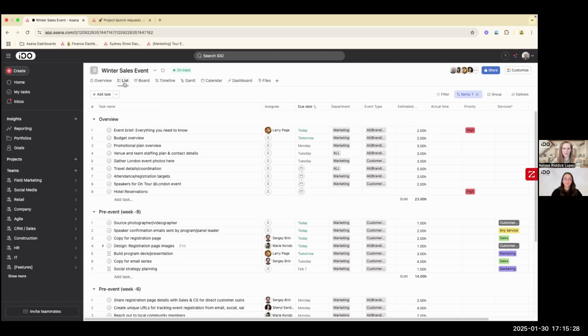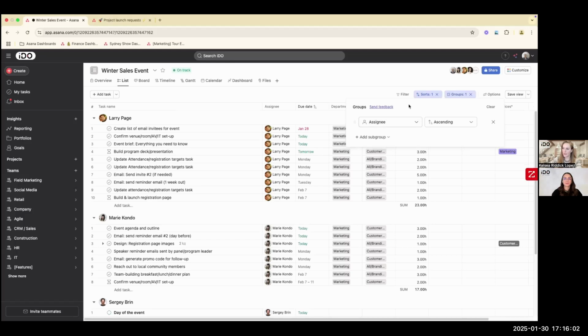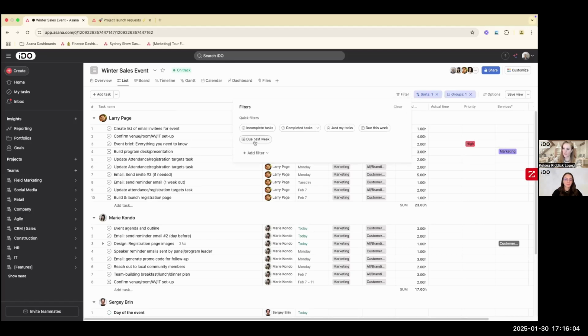Not only that, I'm still going to talk about some custom views. If you are a manager and you're having a weekly meeting to check in on how this project is going, maybe we want to focus on each person's assignments that are upcoming in the next week. That's what our weekly meeting is for, where are you at on past due tasks or things coming up in the next couple of days. We can also create that, again, with just a few clicks, no complicated formulas, by regrouping this project. Let's regroup it by assignee. You can see you have a lot of options here. I'm just going to show you by assignee, and I'm going to put a filter on due in the next week.